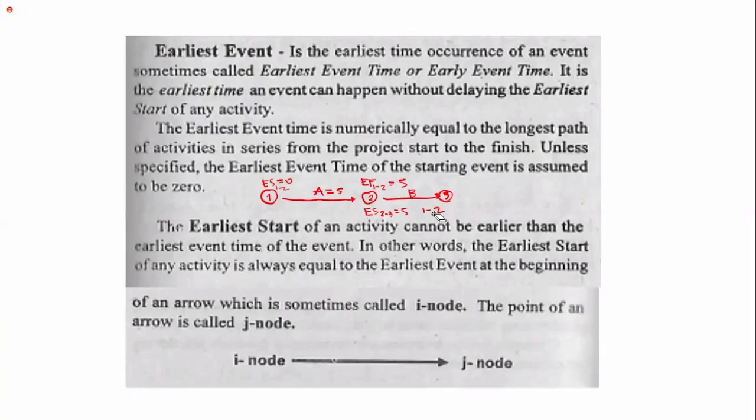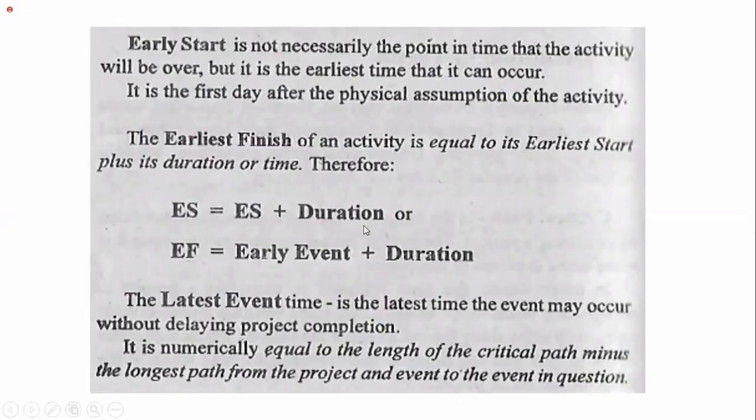Got it? You will understand along the way. The earliest start is not necessarily the point in time that the activity will be over. It is the earliest time that it can occur. Earliest finish is just the earliest start plus the duration of the activity.